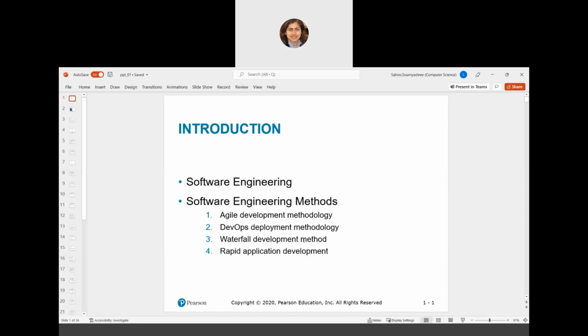Those are the strict phases, and everyone has to obey all of them rigidly. All the phases focus on different distinct goals, and each phase in the waterfall development method must be 100% complete before the next phase can start.